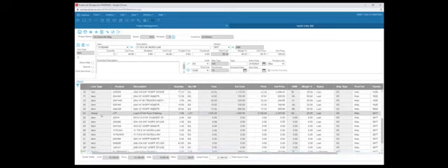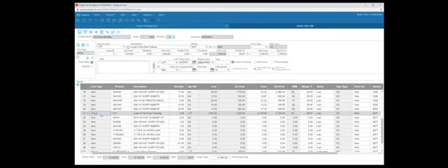One thing I did want to show you too on these groups, maybe more for the direct ship type of stuff, is I can load up a group called Load for First Floor Framing and put a cost and a sell price on the group only, and then pull in all these items underneath it with no pricing and no costing and just quantities.